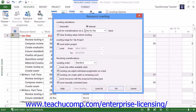Next, decide whether or not you wish to remove any leveling adjustments before applying the new leveling. If you wish to clear old leveling adjustments before applying the leveling adjustments that you're about to create, then leave the Clear Leveling Values Before Leveling checkbox checked. Next, in the Leveling Range For section, you can set the specific range of leveling to use within this project file. If you wish to level the whole project, then leave the Level Entire Project option selected.